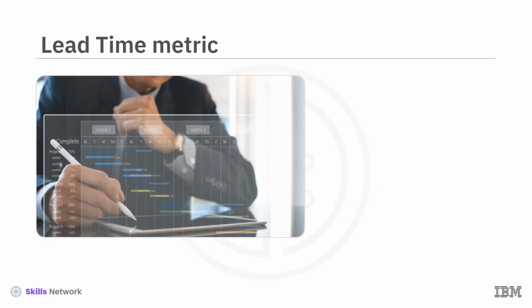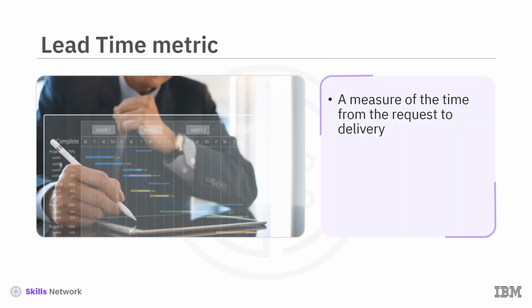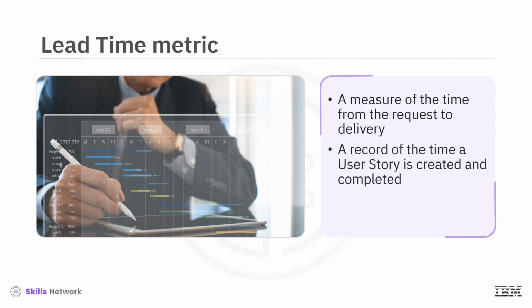Lead time is a key metric for measuring the time from the customer request to when the product is delivered. The product owner records the time a user story is initially created and when it is completed. Then, the product owner calculates the duration.